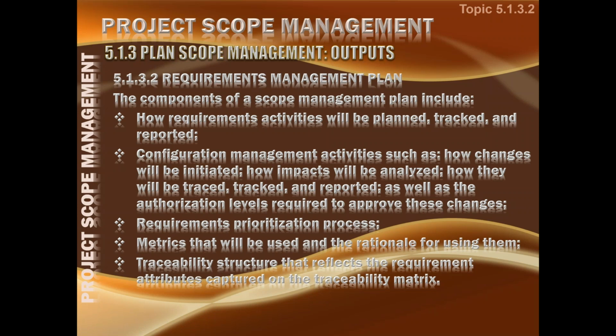So here the components of the requirements management plan will be how requirement activities will be planned, tracked, and reported, configuration management activities, then the requirements prioritization process, how the requirements are to be prioritized, which is the most important requirement, metrics that will be used and the rationale for using them, and the traceability structure, because we will have to develop a traceability matrix that reflects the requirement attributes captured on the traceability matrix.